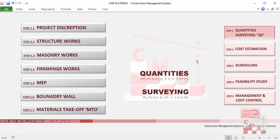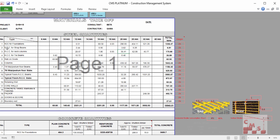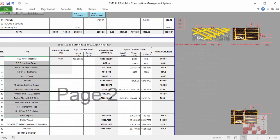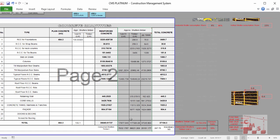All data produced from the quantity surveying is reflected directly in the material takeoff. Here we see all types of concrete, all rebar per diameter — for each member we have a detailed quantity of rebar. At the end, we have how much each element requires for all types and diameters of rebar and the full quantity required for the project, plus the same for concrete — how much is required as reinforced or plain concrete.